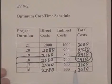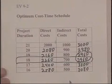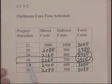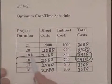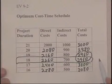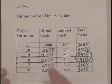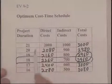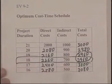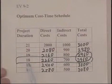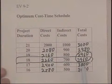There's an additional cost not even considered here, and that is the opportunity cost. If we get this project done in 18 instead of 21, we now have three time units — whether days or weeks — to do other work, which could be another consideration for crashing the project. But in terms of our simple cost-time schedule with direct and indirect costs, the sweet spot in this network is period 18 at a cost of $2,960.